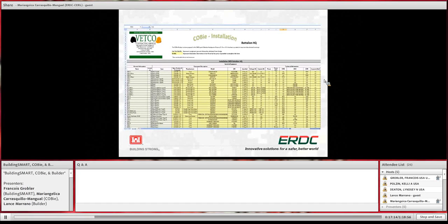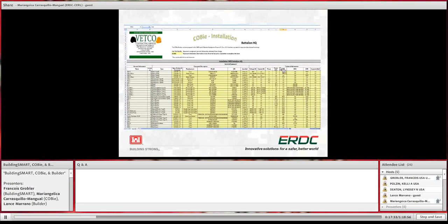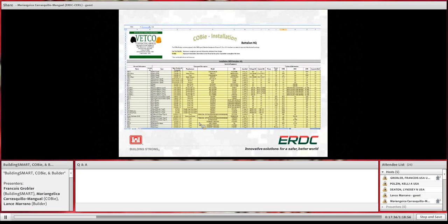And at the beginning, when I told this contractor to provide me the information, he was using his own form and then putting the information into RMS and into the little tool I gave him. So we did this so he only had to do it once, and he agreed. He gave this to his subs, and they were actually giving him this information in this format. They found it's better for them as well because they now know the location of the equipment, which is faster for them to find it.